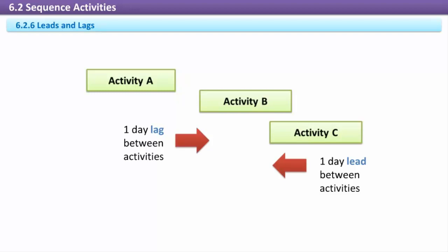Leads speed up activities without changing the relationships between the activities. We can think of leads as negative lag because they allow activities to occur in parallel that would normally be done sequentially. For example, after the parking lot has been resurfaced with asphalt and the painting of parking spaces begun, installing the signs for handicapped spaces could start even though striping of the spaces is not done. Activity C, posting handicapped parking signs, will begin one day before activity B, striping, is scheduled to be completed. Leads can lead to rework and usually pose other risk factors as well, so they should be used carefully.